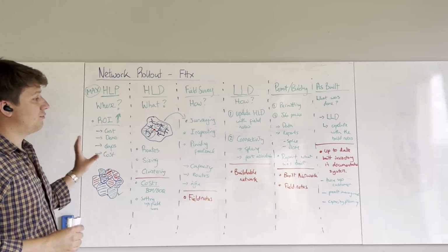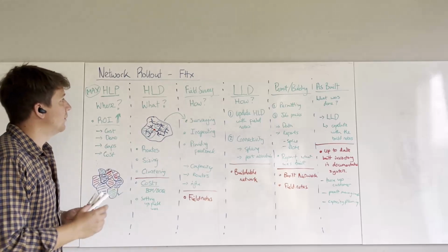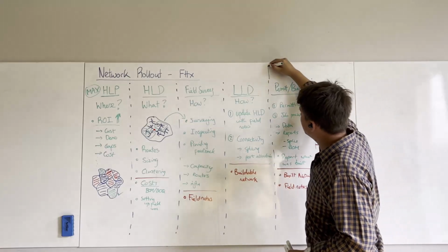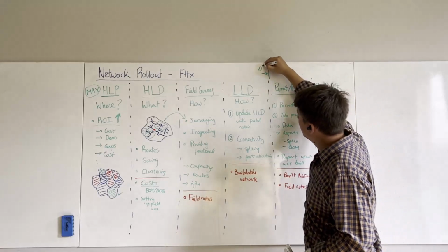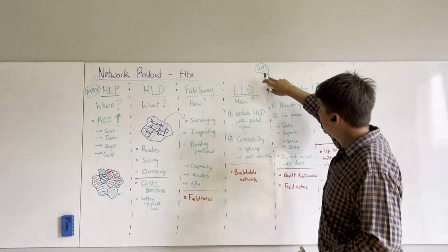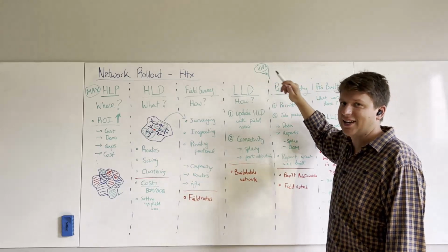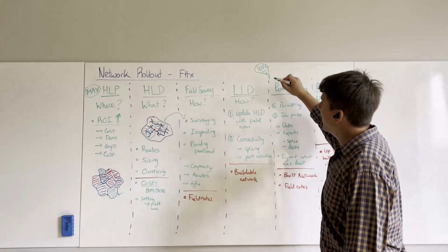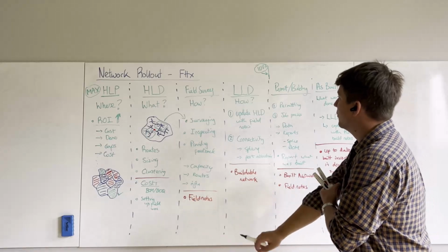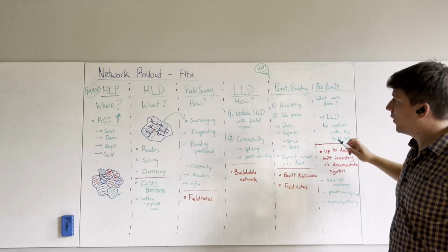And part of what feeds into that is that this process will actually get refined and better over time. What we're aiming to do is get to this build bit, at the end of this stage, going into the build, to 100%. And what I mean by 100% is that when they go out and build it, they change nothing. It was designed exactly as it was built. Now, we're not ever really going to get there, but we want to get as close to that as possible, right? So that there are no changes here, and there's less work that needs to be done here as well.